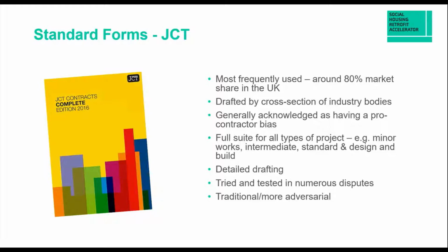So looking at the first suite of contracts, that's the JCT, and some introductory points. As you can see from the first bullet, JCT is the most frequently used contract. So around 80% of UK projects use this. I think currently it might be slightly less, maybe 70%, but nonetheless it still is the most frequently used.